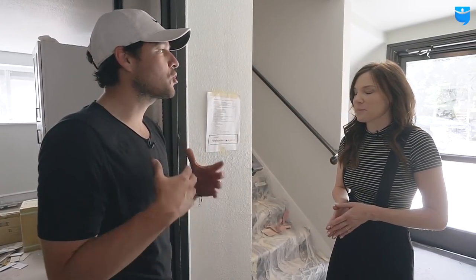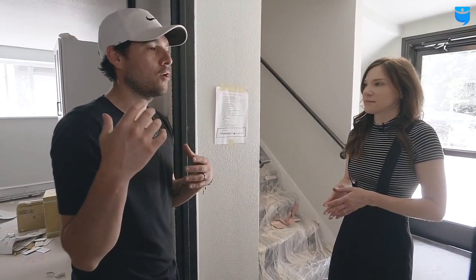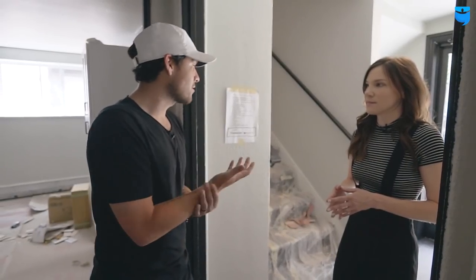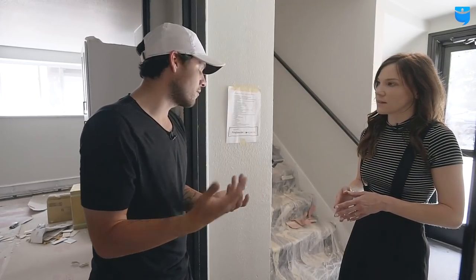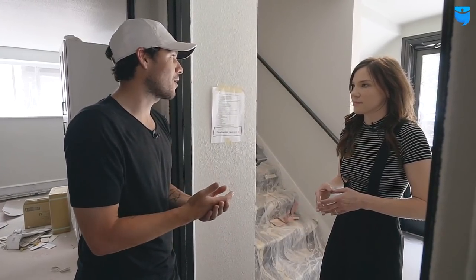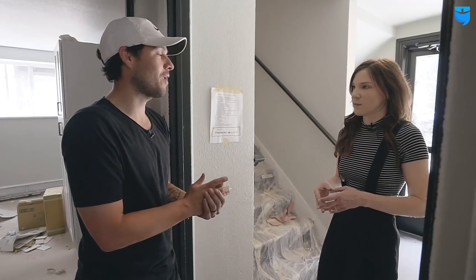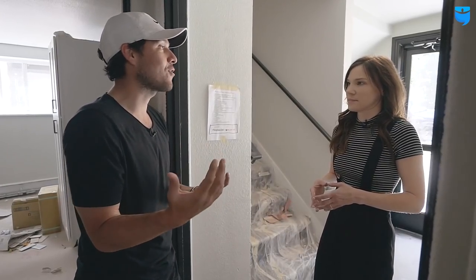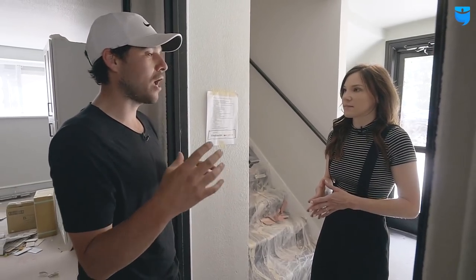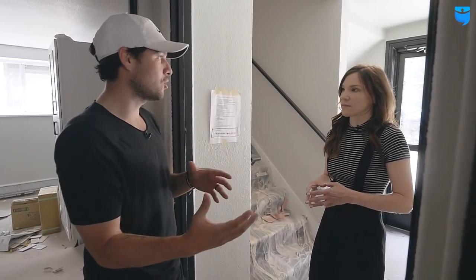So that's great. You're always trying to find ways to align interest with brokers, with contractors, with bankers, every single way that we can along the process. Yeah, because on single family, we would be spending maybe $2,000 to $3,000 a month of holding cost. On multifamily, you're spending $10,000 to $20,000 a month, depending on the size of the project. So like sometimes $500 a day. So that starts to motivate you to really fine tune. How do I get guys to do things faster, still get the quality?